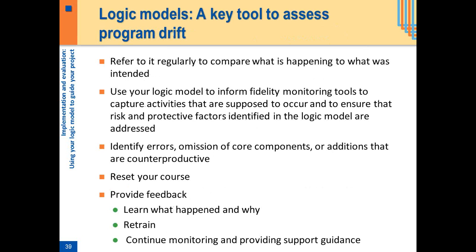And what a surprise, the logic model can help you assess program drift. So that's one of the reasons that we brought this up. On our projects, we refer to it regularly to compare what's happening to what's intended. Your logic model can inform your fidelity monitoring tools because you're listing right there your activities, strategies, and outputs that you're looking for. So your fidelity monitoring tools should reflect what you put in your logic model under those categories. And it can also ensure that the risk and protective factors that are identified in your logic model are addressed. The logic model can also help you identify errors or omission of core components or additions that may be counterproductive.